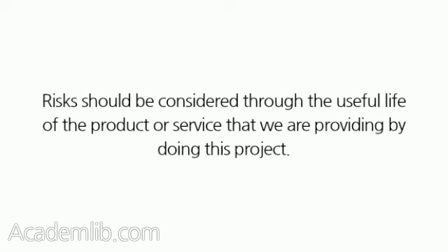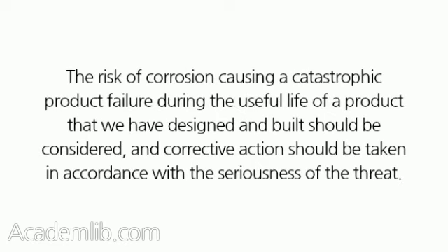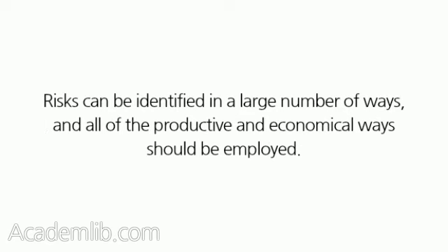Risks should be considered through the useful life of the product or service that we are providing by doing this project. The risk of corrosion causing a catastrophic product failure during the useful life of a product that we have designed and built should be considered, and corrective action should be taken in accordance with the seriousness of the threat. Risks can be identified in a large number of ways, and all of the productive and economical ways should be